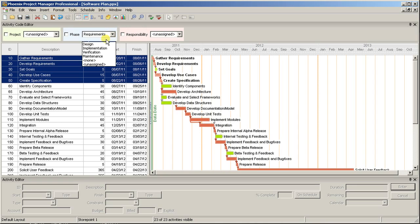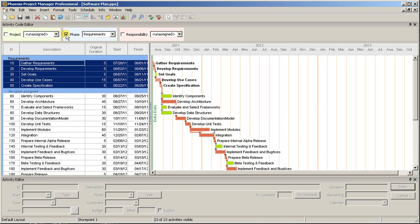To enable organization by the Phase Code, click the checkbox next to Phase in the Activity Code toolbar. Now you should see the selected activities display requirements, while the remainders show no value assigned.